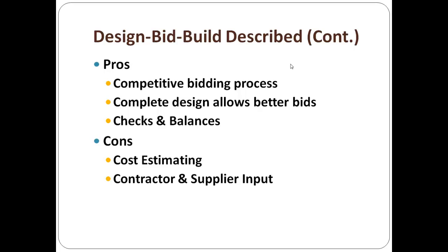Secondly, without the contractor and the suppliers having input during design, it can affect the cost of it. You can't do value engineering during the design phase to get input into different ways to approach it. It helps to have a builder on board during the design, because he is the guy that is actually putting the building together, and the suppliers.